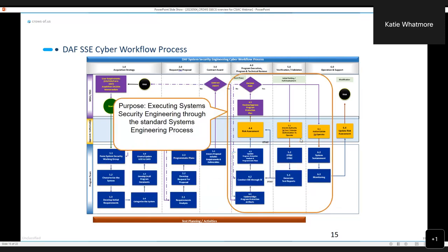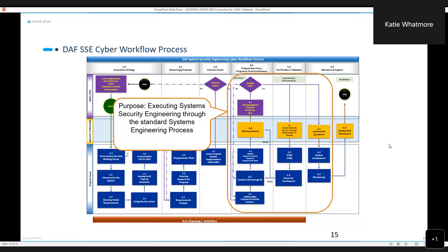Within Appendix A, there is information on entrance criteria that should be included in your RFP as far as the systems engineering technical reviews go. And what this does is it helps ensure that as you're approaching these technical reviews, which are essentially decision points to proceed on and continue development, whether or not you've actually addressed the system security engineering concerns adequately. By putting that in there, that makes sure that the program will address those instead of waiting until it's too far down the line and more costly.